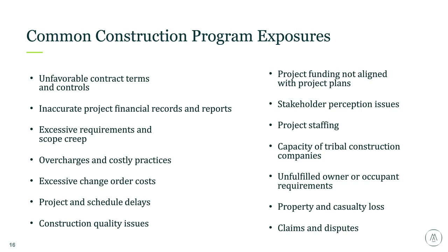We'll get into this a little bit further in detail, but by incorporating clear guidelines of allowable personnel, allowable rates, burden charges, and on-site, off-site requirements within the contract, you can help mitigate the risk of getting charged more than you should. This level of scrutiny needs to be applied on all the different cost types, not just labor, but I was using labor as a good example as it's a common area of excessive charges.